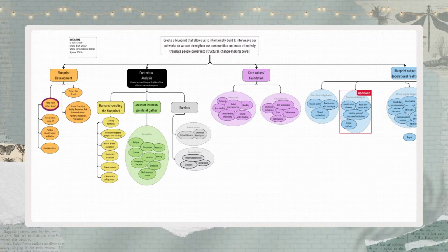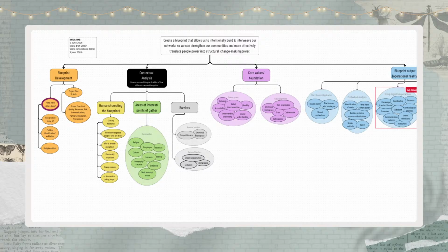Yeah, because I think, sorry, I didn't mean to cut you off. Yeah, so we will not finalize all the levels for all the categories or objectives. We will have the final WBS, and then we may break one of the third levels into fourth and fifth if needed, so you can see how the process goes.